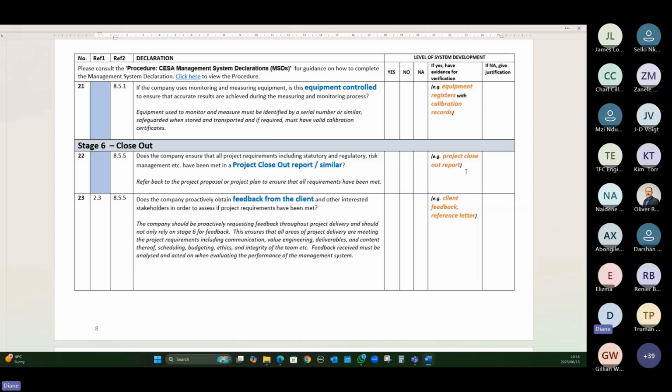But generally, if you're not doing closeout reports, I like to do a closeout checklist that ties back into the requirements that we set up front. So I'll have a look at what was in my contract, what did we agree to with the client right up front. I'll also tie it back to my project plan, my quality plan. We identified these were maybe our objectives, these were our risks on the project, just to make sure that we've closed out and addressed all those issues.